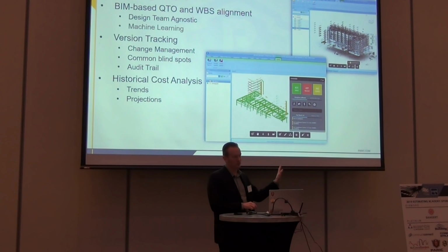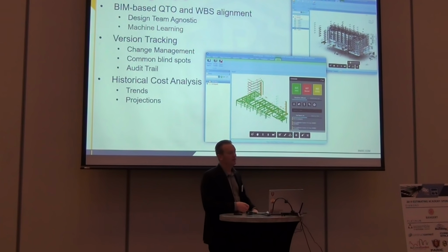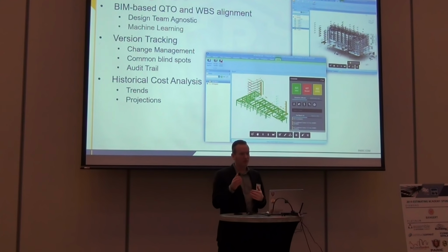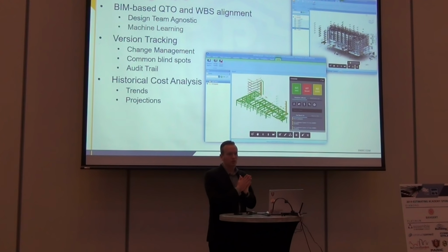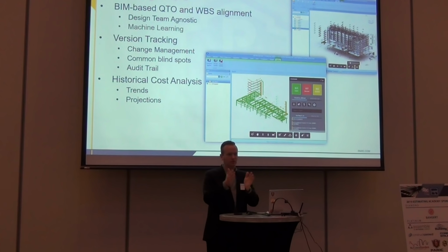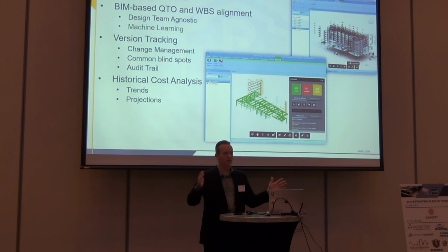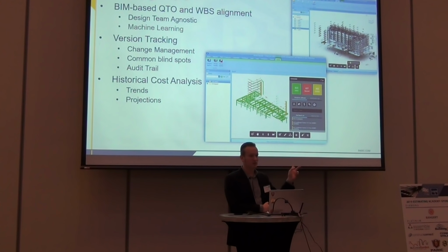This is one of our favorite tools. I mean, we use the same thing with 2D, but with 3D, this is fantastic. As we go through the different estimates that we put out, now we can go back over our timeline and use a change tracker tool. We can understand in version 1, version 2, version 3, version 15, what happened in all those estimates. Quick snapshots, or we can go back to the actual models, roll back in time, and see what's actually going on with the model.